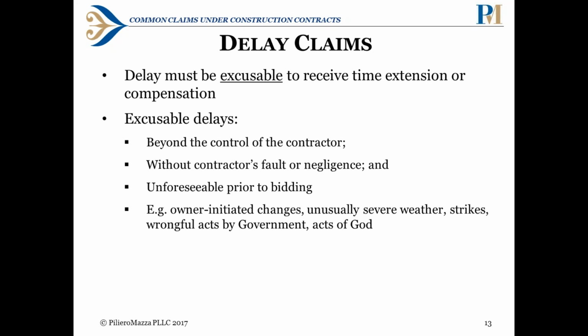To improve your chances of recovering for delay damages, you should document every delay that occurs and keep track of weather conditions. You should give notice whenever there's a delay impacting your work, and you should update your schedules. I know I've been in situations where contractors say, I'm trying to get the job done. I don't want to stop and paper everything. But having those updated schedules and having documents showing what's going on will really help you in the long run.